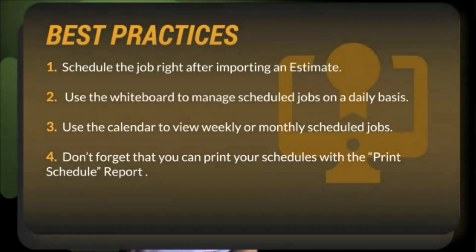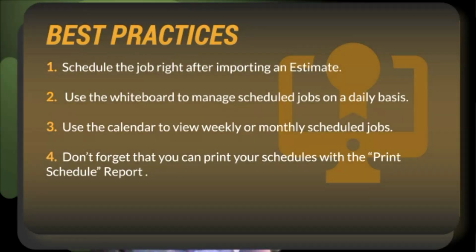So when you are scheduling your work, the best practice to follow is to schedule the job right after importing an estimate or once your customer has paid their deposit. Now, remember, if some of you are setting up milestone payments in your estimates, and one of those milestones is a deposit so you can order the parts from your vendor, then as a recommendation, schedule your job once you've got confirmation of when you're going to be receiving the materials that you're going to need to do the actual work area or the actual project.